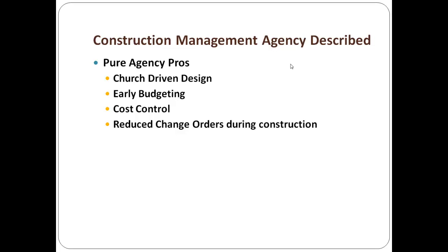Another advantage is reduced change orders during construction. If you have a lot of eyeballs looking at this, you've got a better chance to identify aberrations in the plans that are conflicts, as we talked about, code violations, and they're analyzing the blueprints, trying to get them as perfected as human beings can get it perfected, so that the government doesn't make you make changes, or you catch architects' human error, or you have something that's going to be too expensive.